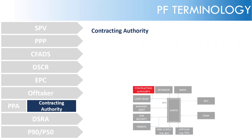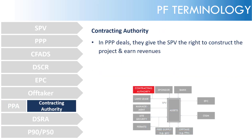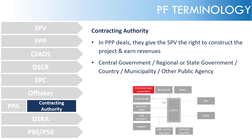Contracting authority. In PPP deals, the contracting authority gives the SPV the right to construct the project and earn the revenues. The term contracting authority could mean any of the central government, a regional or state government, a county, a municipality, or any other public agency.